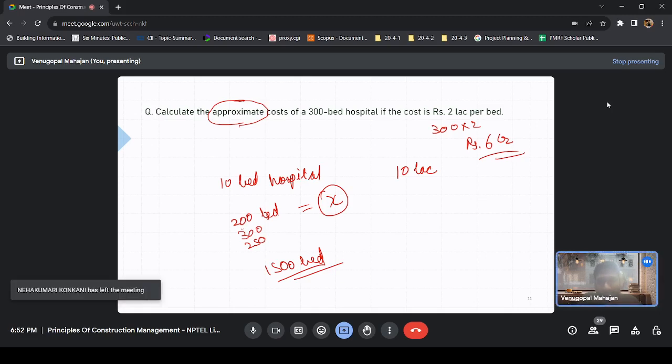See, the only thing that has changed is, when you are talking about unit cost estimating, you are fixing some parameter and working with it. In parametric estimating, you are also doing the same, but parametric gives you some leeway. Right now we had a linear parameter, one parameter, one value. In parametric, you can have multiple parameters varying and giving you the value.